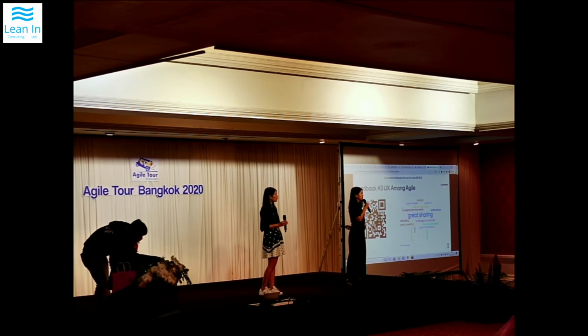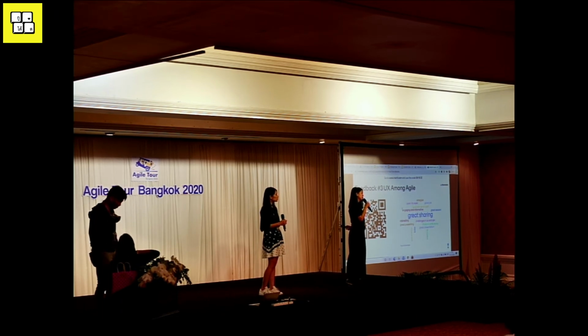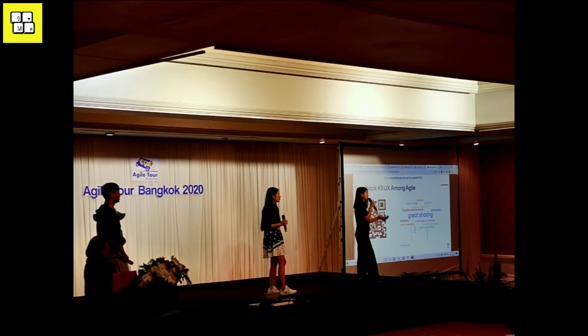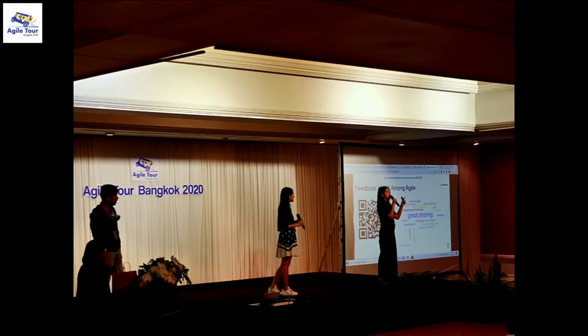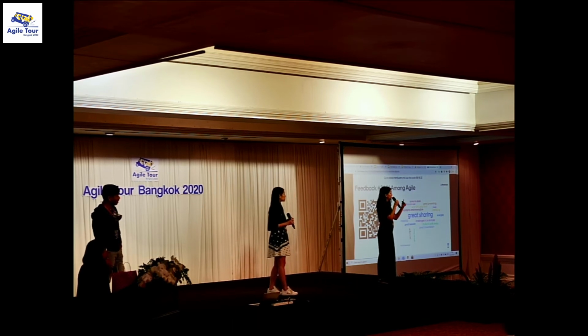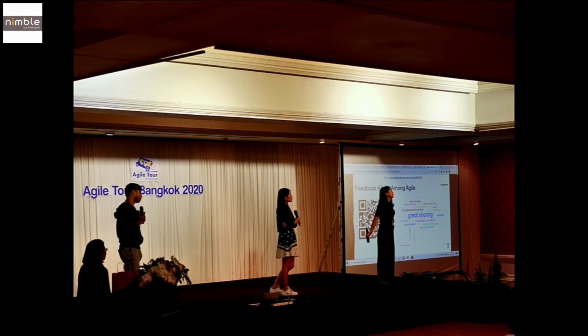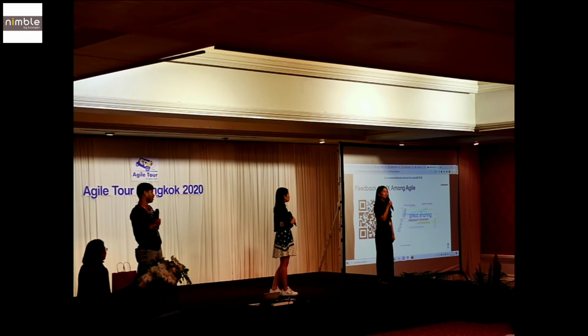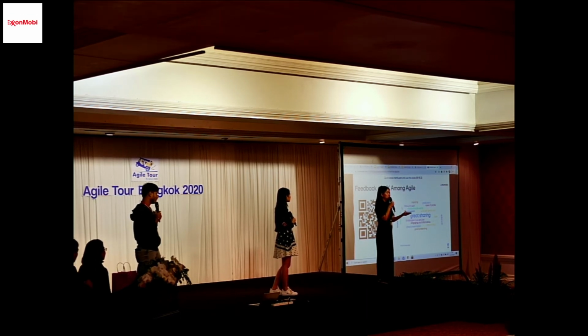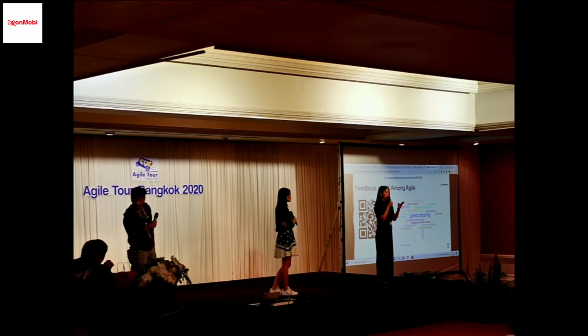So that means we have to do it in advance, right, before going into the sprint. But the question is how long that takes. Are you still doing it in the current sprint? If you mean one feature or use case, for example, a new product for manufacturing like this, I think it depends on the number of users and which locations we are going to roll out to. It can take two sprints, two sprints to do the research. But if it's a small one, we can do it in one sprint.